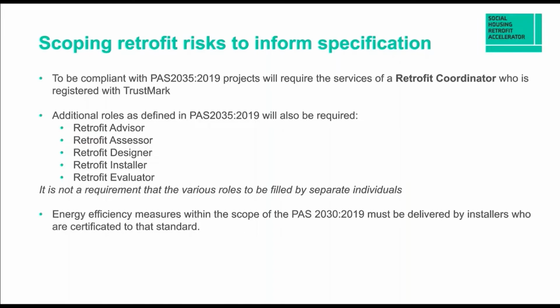They in turn will be ensuring that a retrofit designer, someone qualified in that, is engaged. These roles are a little bit interchangeable, in the sense that someone like an architect could equally be a retrofit advisor, a retrofit coordinator, a retrofit designer, potentially a retrofit assessor as well. But realistically, there's an advantage in having these roles as distinct. You don't want a retrofit evaluator, retrofit coordinator and designer all being the same person.